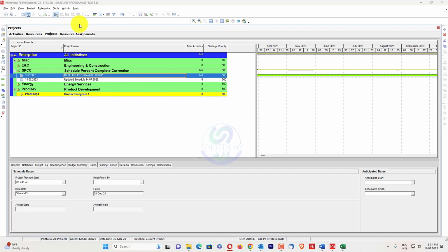We can say that for two periods, for example, there is 31 July and the difference with 8 August, it will calculate your difference, but it will not deduct your non-working days. But in Primavera P6, there is a function that is calendar. It is focused on calendar. Calendar will minus your off days, and then it will calculate your schedule percent complete. But it's only for activity percent complete.